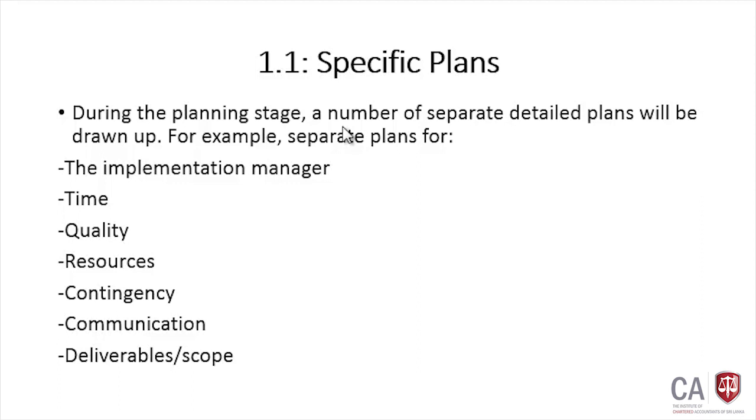Then another one is resources. This plan checks peaks and the workload, right, to ensure the human resource plan is feasible. Here we look at what particular time we need resources, at what point we need more resources, at what point we have idle resources, then accordingly we plan for that. For example, when there is a requirement to get additional resources, we make the arrangement. When there is a time period where some members have idle time, we may ask them to go for some other work. Like that, we will plan here.